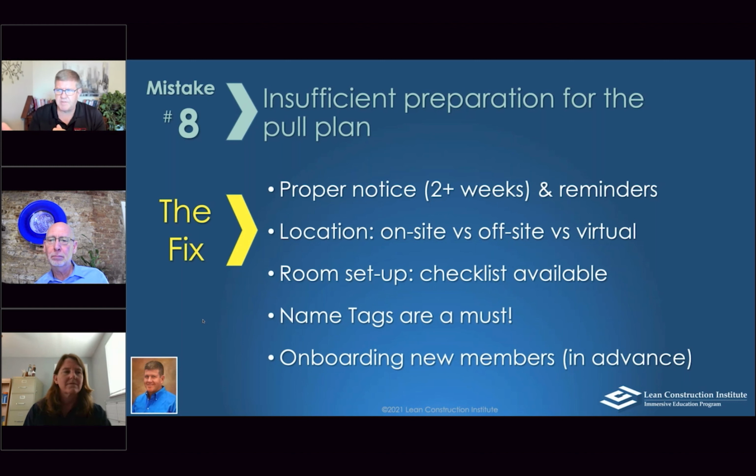Did we give proper notice, right? Two weeks or so in advance, because people are generally committing half a day of their time to these pull plans. And not just sending out the email, but reminders, following up with phone calls, making sure that the right person's there.